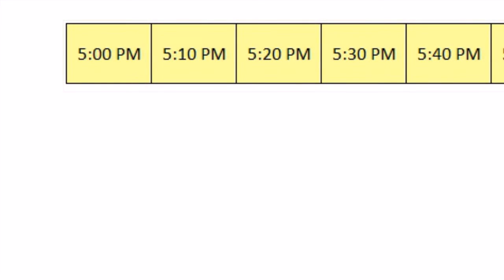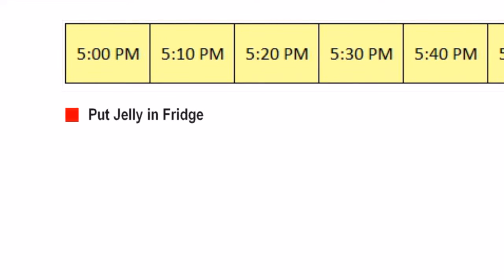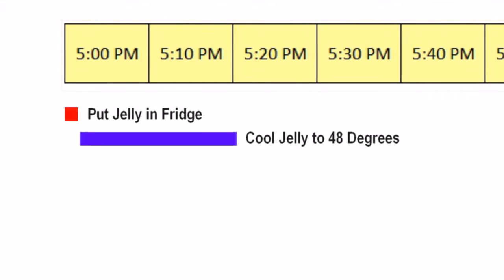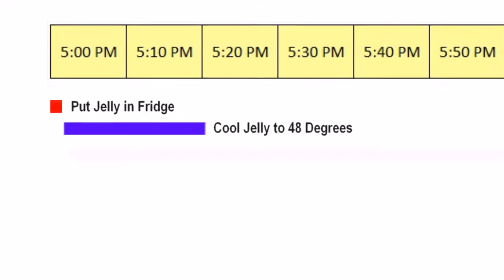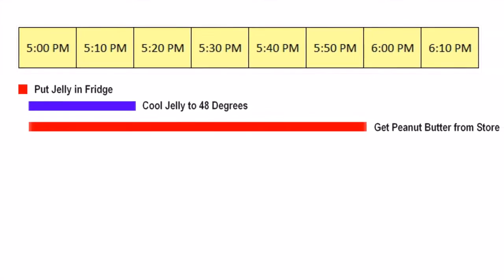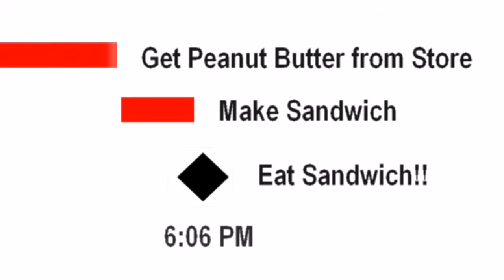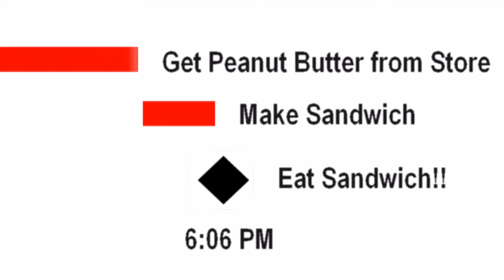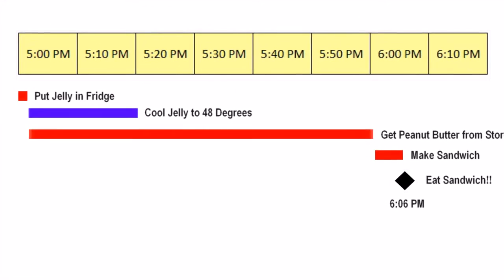Say I immediately put my jelly in the refrigerator at 5 p.m. and it took me one minute to do that. Keep in mind that it's going to take 20 minutes to cool down. After I put my jelly in the refrigerator, I left for the store and it took me one hour to get my peanut butter and then get home. Once I got home, it took me five minutes to make my sandwich, so by the time I'm ready to eat my sandwich, it's 6:06 p.m. That's the one minute for the jelly plus one hour for the peanut butter plus five minutes for making the sandwich.